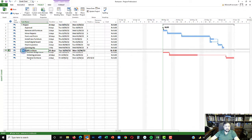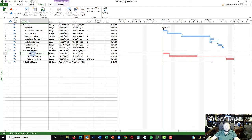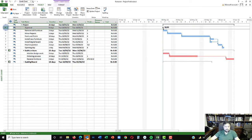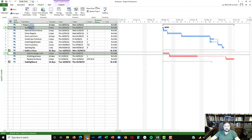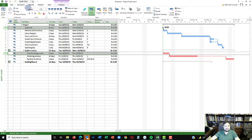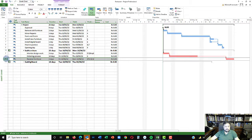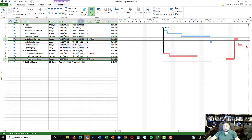Now we need to create the links. For the furniture sub-project, once approval has been given, the interior design work can start. The simplest way to create a link is to click on the predecessor, then press Control and click on the successor activity, then go to Tasks and click the Link button. Next, once furniture is received, you can install it — so the predecessor is 'receive furniture' and the successor is 'install furniture.' Now you can see that when the furniture is delivered, only then can installation begin.